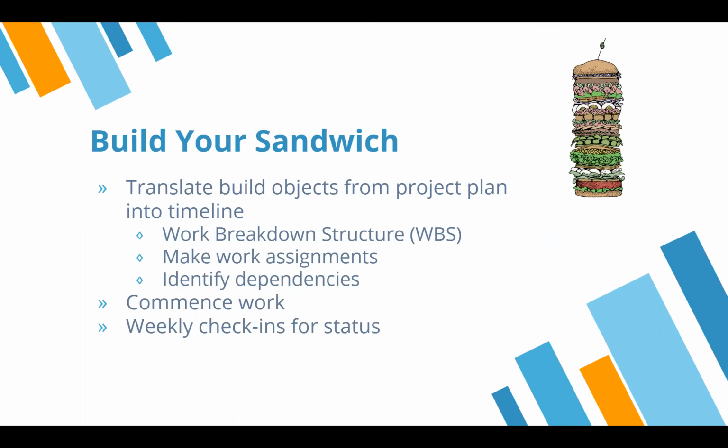If they've never done it before, oftentimes people feel pressured to, I guess, shorten up the time that it takes. And a good project manager can also have a sense that they may be undercutting their estimate, so you can help them make sure that they have enough time. The worst thing you can have happen is everybody undercuts their time, everybody feels like they can get it done a month earlier, and then suddenly you're coming closer to that time frame and you see you're not even halfway done. That's going to be a problem.